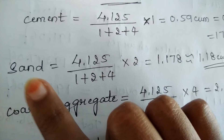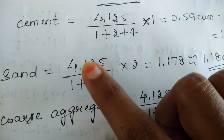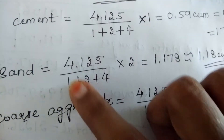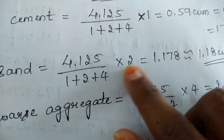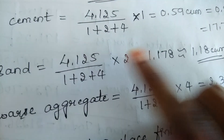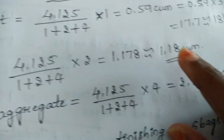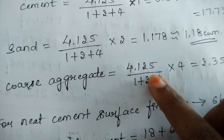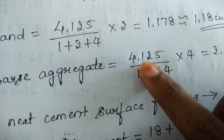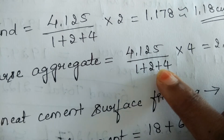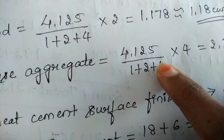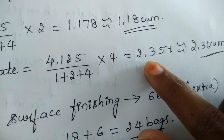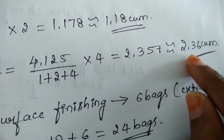Finding the next quantity — sand. Again we take dry volume 4.125 divided by 1+2+4, into the part of sand which is 2. On simplifying we get approximately 1.18 m³. Moving to coarse aggregate: again 4.125 divided by 1+2+4, into the part of coarse aggregate which is 4. On simplifying we get approximately 2.36 m³. So this gives you the quantities of all three materials.